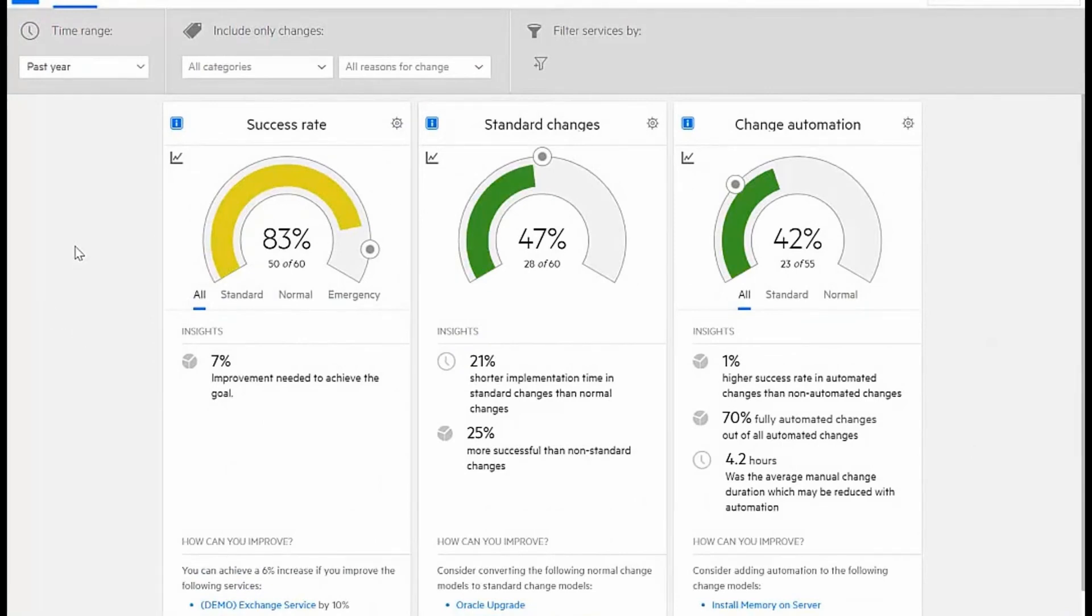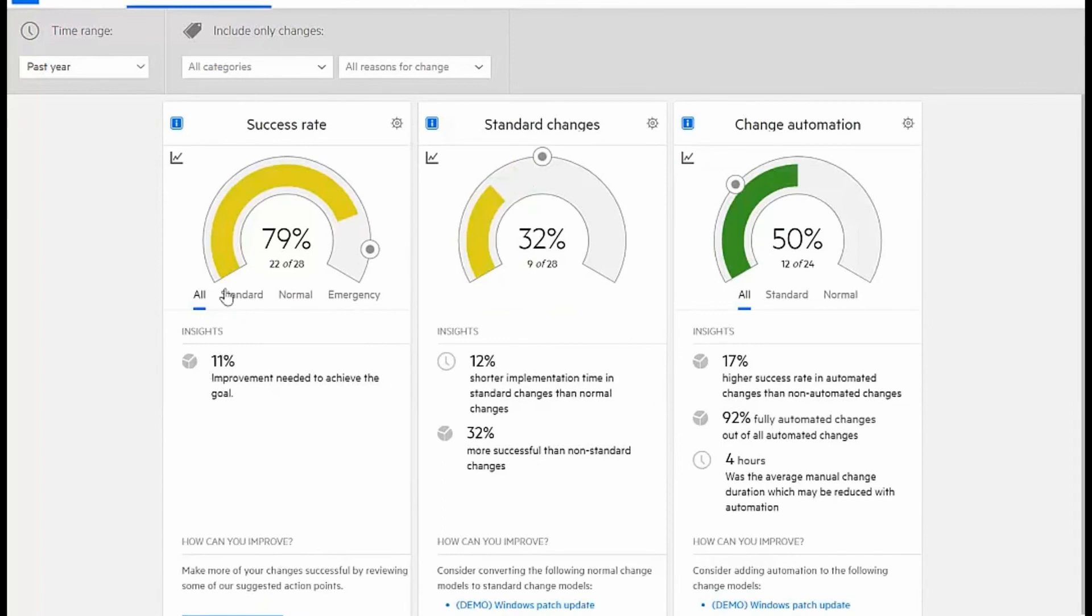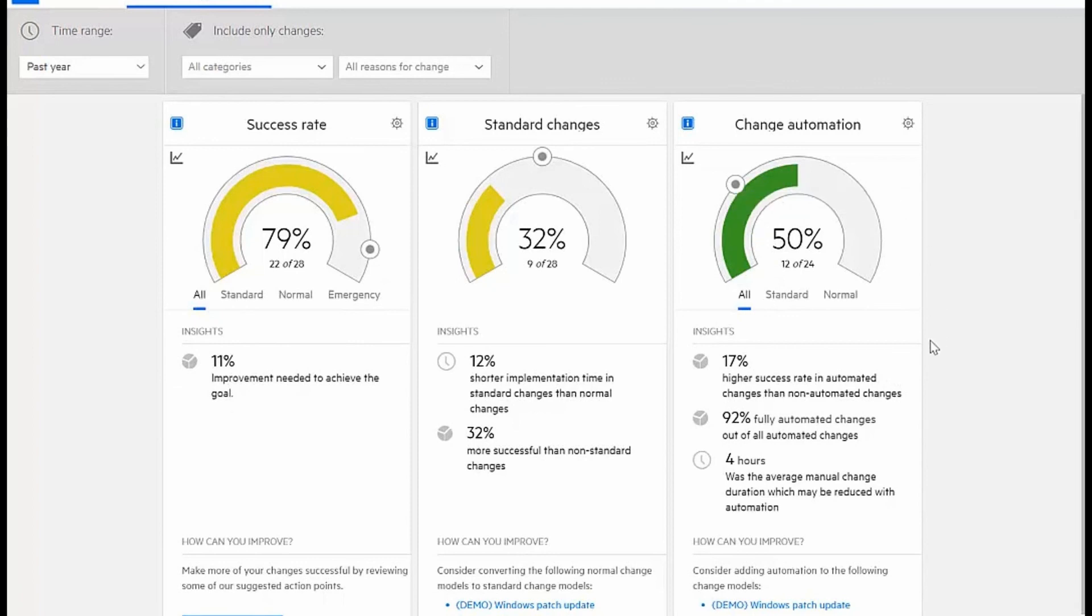Another very valuable tool is this report of change analytics where I can look at success rates, the amount of standardization, as well as the automation that has been taking place. I can improve my success rate overall by making a focused improvement in changes related to the Exchange service. Right now I have a 79% success rate in performing changes to this service. You can also see that I've only been automating about 50% of them, yet I can have a higher success rate if I implement further automation.